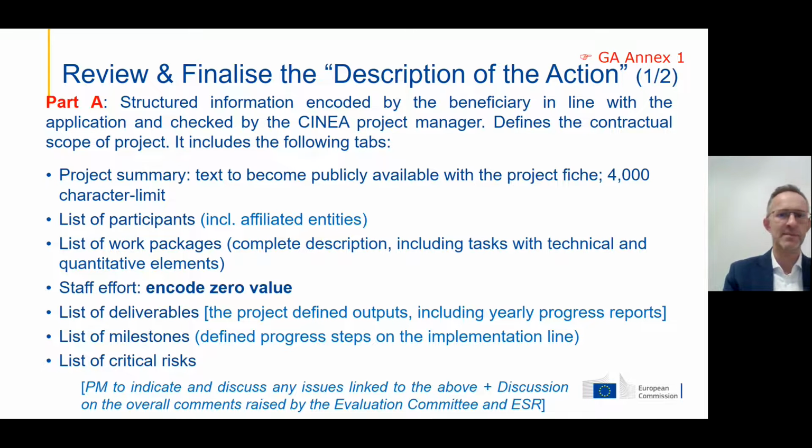Then you have the list of participants, including affiliated entities, and the list of work packages. Please define them. Please provide a complete description, including tasks and technical and quantitative elements. We will need all that to follow up on the scope of the project at a later stage and check what you need to deliver on. There's staff effort. Don't work too much on this. Put 0 value everywhere. This is not really relevant for the Connecting Europe Facility program.